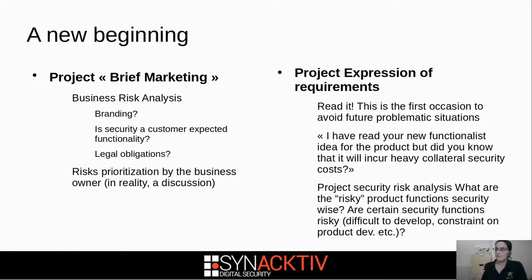So it's the moment that you're able to go to this person and say, hey, I've read your need. Are you aware that there is a big security cost associated with your demand? Do you know it? And most of the time, they don't. So you have a chance here for the people to say, actually, it's not that important. It was just nice to have, we're just going to scratch it. And it's better to see it now than, I don't know, three months into the development phase.